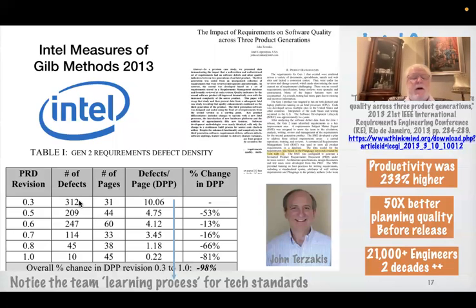They check against a set of rules like should not be ambiguous, should be clear, should be consistent, should be complete, that kind of common sense rules about requirements. They find 312 defects, so that's 10 per page. Now, they have a thing called an exit level, and they've computed what exit levels they have to go for that pay off. It turns out 10 is 50 times higher than is cost effective. So they say, no exit, go back, try again, try to follow the rules.